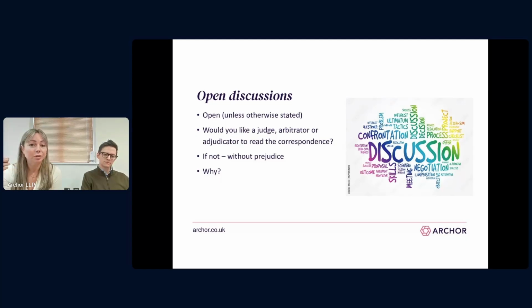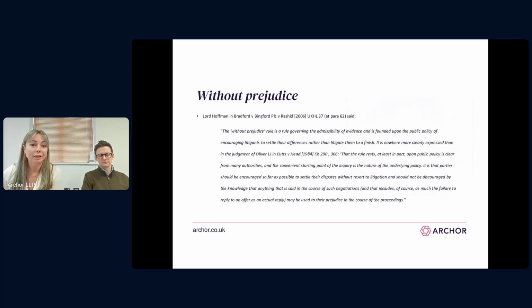Perhaps you want to concede on a point to try and do a deal, but you don't want to lose the right to argue it later. If this is the case, any such communications need to be clearly marked that they're without prejudice. The purpose of without prejudice communications is to encourage parties to resolve their disputes by allowing them to speak freely and make concessions without the fear their statements will be used against them in court or adjudication later.